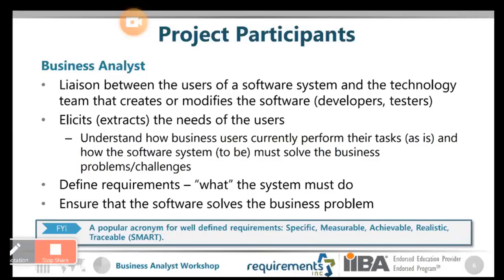So what you're committing to is the payroll system. But if you look at it, the timekeeping system is kind of on the borderlines, right? Because there might be another timekeeping system, and along with the payroll system, they might say, oh, by the way, can you also update the timekeeping system to this because it's related and whatnot. So again, you have to always question yourself, what is the root of this requirement? Does it fit well within the bounds of what was committed to deliver?